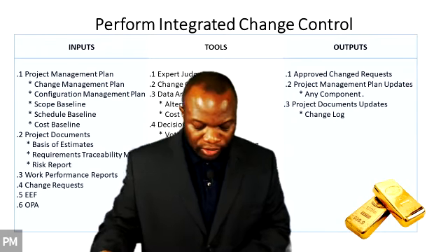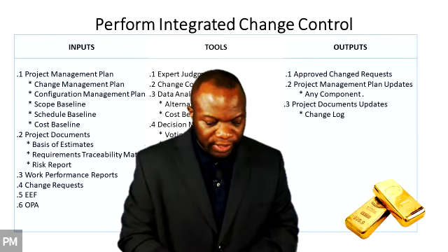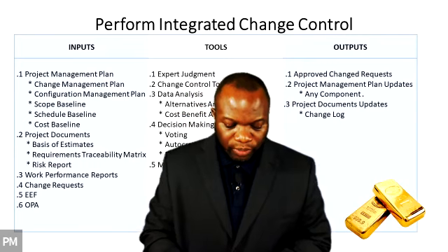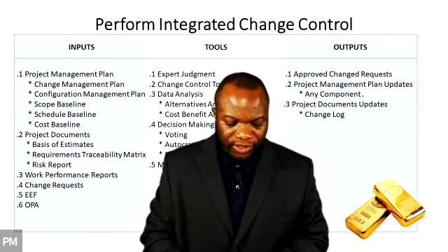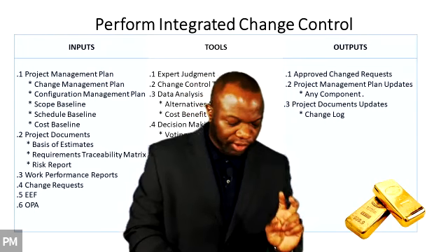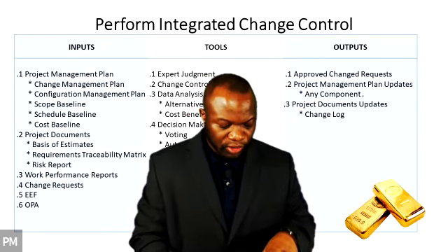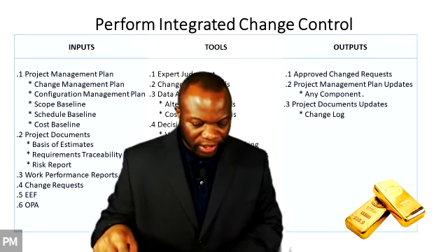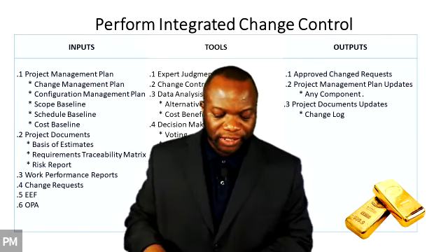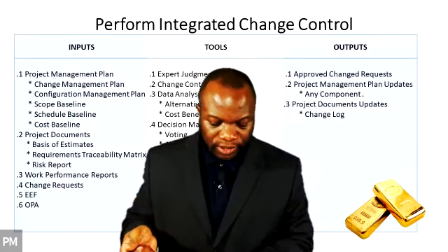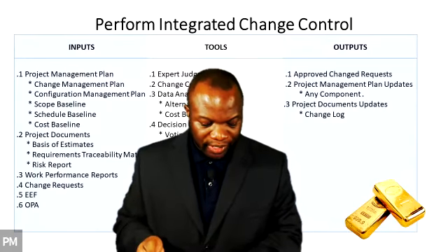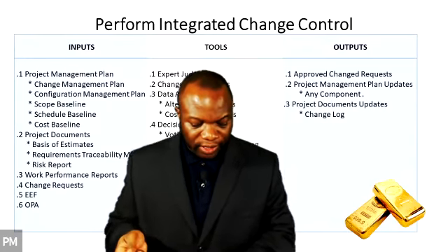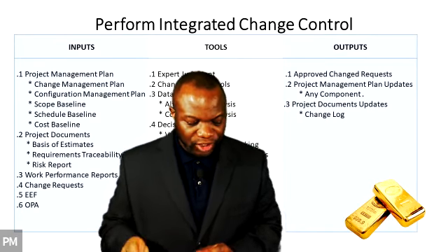And then it goes on to page 119 and says tools should support the following change management activities as well. So you've got those three. The tools should support configuration management, and the tools should support change management. And the change management activities are identify changes, document the changes, decide on the changes, track the changes.